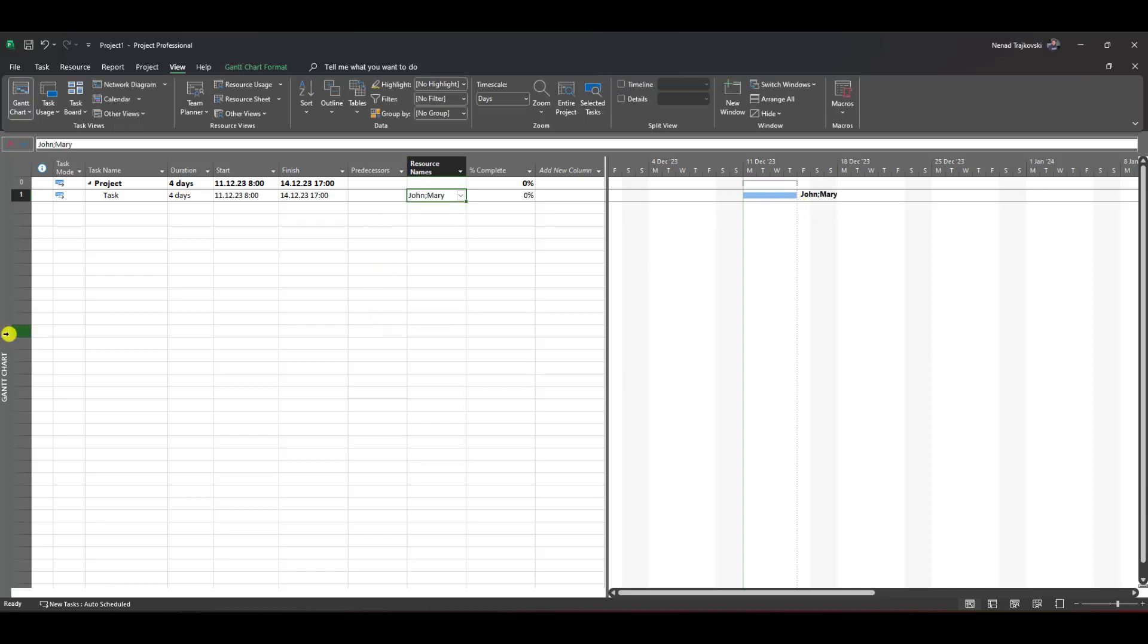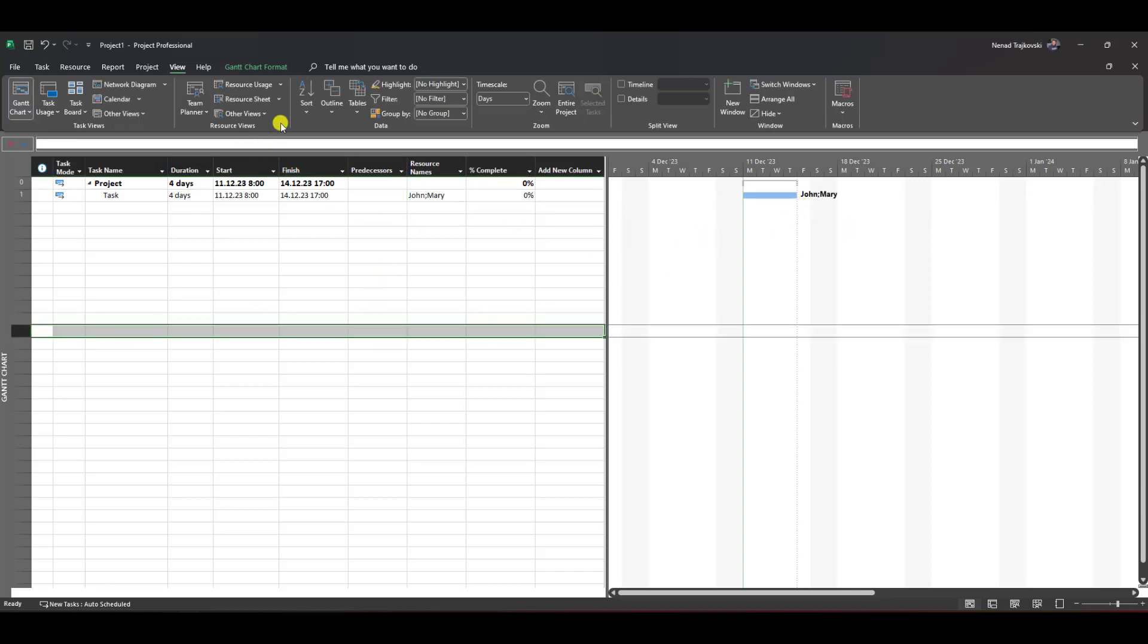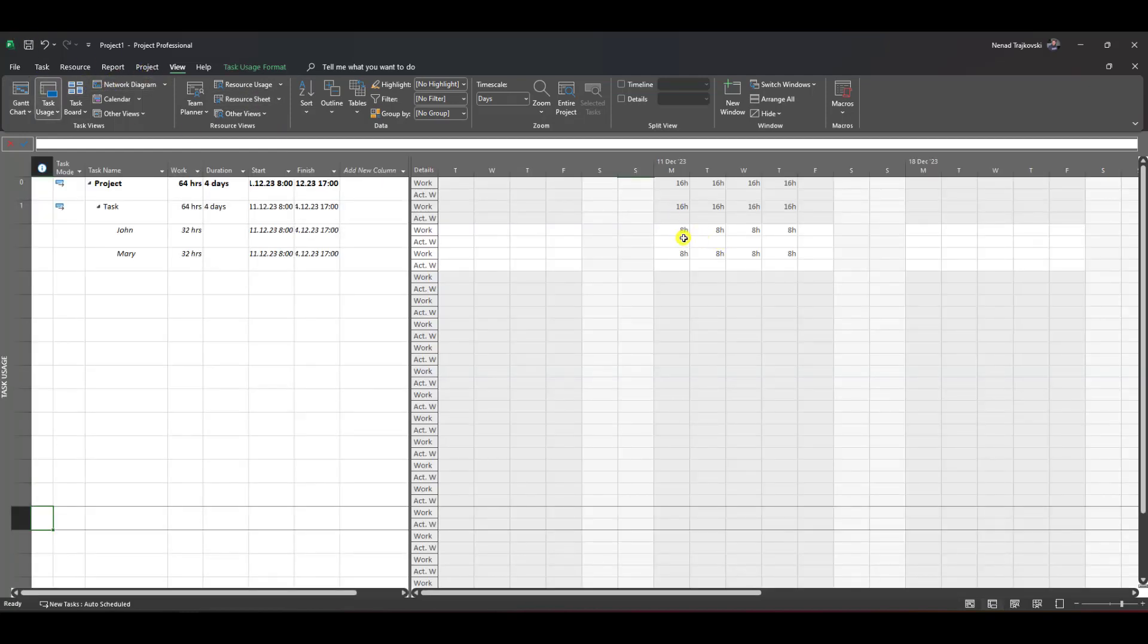John and Mary are assigned here. If I go to Task Usage, you'll see they should work eight hours per day, but nothing is done yet.